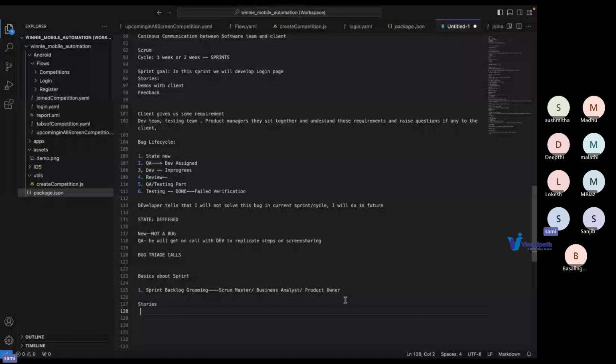Okay. So what these business analysts or product owners will do, they will create a story and they will add something called an acceptance criteria to that story. So acceptance criteria is nothing. It's basically when you as a tester get this ticket, what all things you need to check on high level. So when the story will be marked as done. Say for example, my acceptance criteria usually will be in this format.